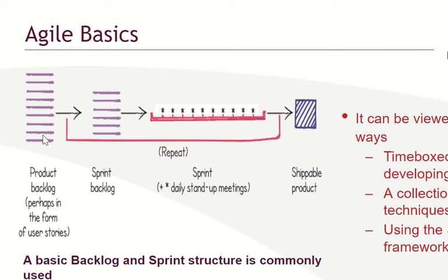Do you want people to be able to buy stuff on the website? Will you want to provide opportunity to be able to pick up, delivery approach as pick up, or you are going to deliver to their house? Are you going to be able to calculate how much the delivery will be? What are the criteria? All those things, the features, the things that will be there, they are part of the product backlog. Now, this product backlog, they are expressed many a times in form of user stories.